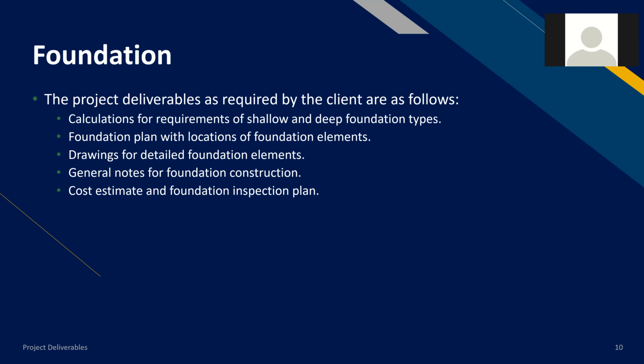The project deliverables for the foundation part of the project are calculations for requirements of shallow and deep foundation types, a foundation plan with location of foundation elements, drawings for detailed foundation elements, general notes for foundation construction, and the cost estimate and foundation inspection plan.